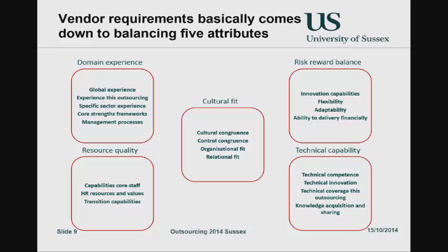When selecting your criteria, would it be a good strategy to share it with your vendors so they can focus on where you need? Should be in your bid document. As I mentioned last time, when you've decided on what this is about in your business case, you will put in the bid document basically your selection criteria. Perhaps if you're that formal, you may have a suitable formula to weight the various elements. You tell them that as well. Yeah? And then they can tailor their bid to what you want.